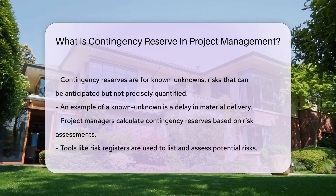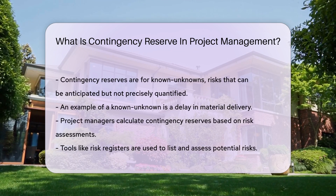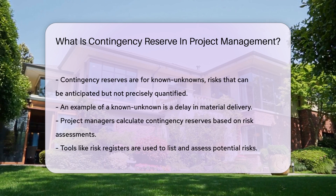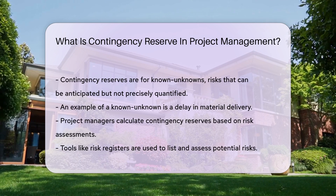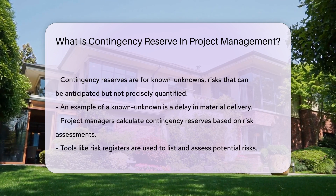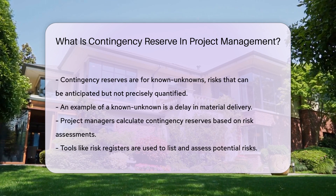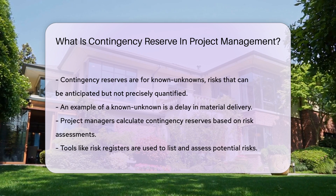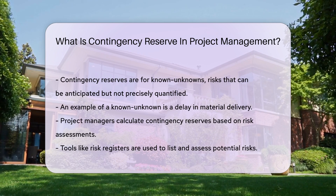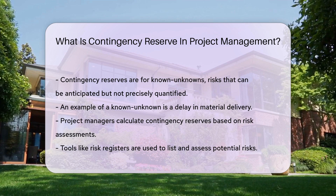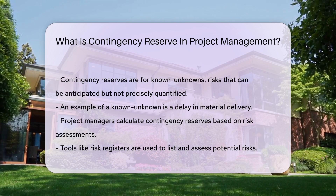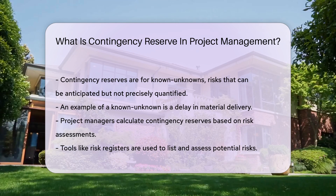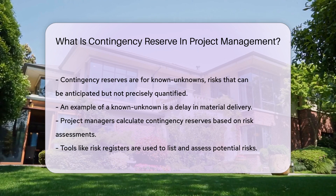Project managers calculate contingency reserves based on risk assessments. They use tools like risk registers, which list potential risks and assess their impact and likelihood. Based on this, a percentage of the project budget is set aside. This percentage varies from project to project, depending on the level of risk involved.